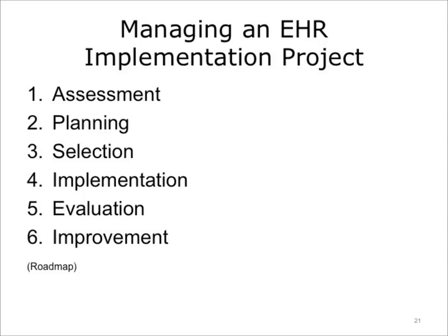The assessment stage helps prepare for the implementation by completing a practice readiness assessment. This includes a profile of the organization in terms of goals and priorities, and an assessment of IT, healthcare, and business and office personnel. A hardware requirement analysis is also carried out at this stage. Step 2. Planning. The practice data collected from the previous stage is carefully reviewed. Based on this, the electronic health records implementation goals are defined, and improvement opportunities are identified and targeted. Step 3. Selection.